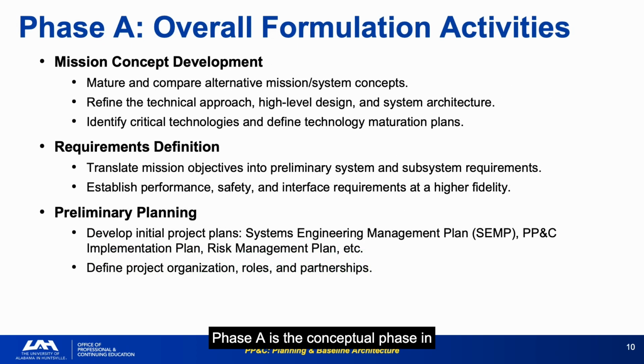Phase A is the conceptual phase in which the program defines what it wants to build, what it needs to know technically, and what resources it will require before any major design work begins. The three major activities, concept development, requirements definition, and preliminary planning, are iterative. You do not finish one before starting the next. They inform each other continuously.